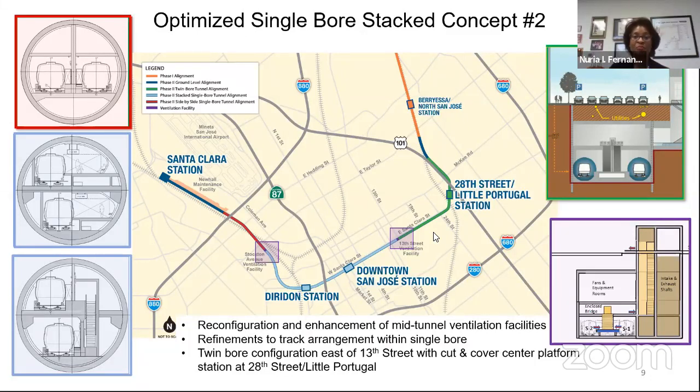Once we commit to a project value and cost, we're going to be pretty much fixed as it relates to the federal contribution. So we want to get it right. That means that we're looking sometime in the fall, after we get the schedule and budget component from the analyses of this new configuration. Thank you.